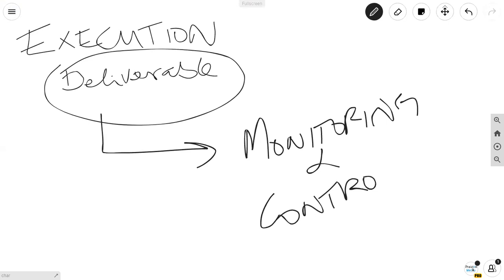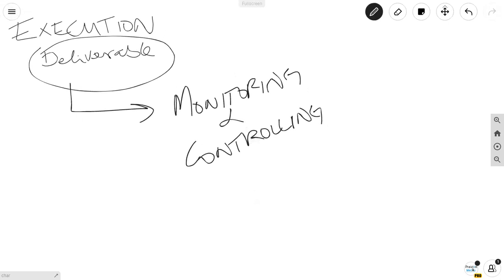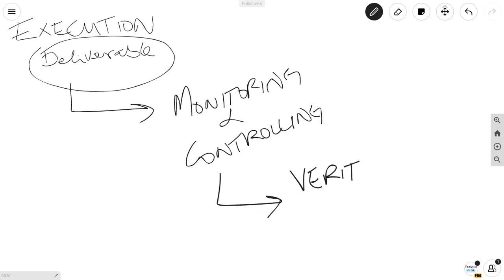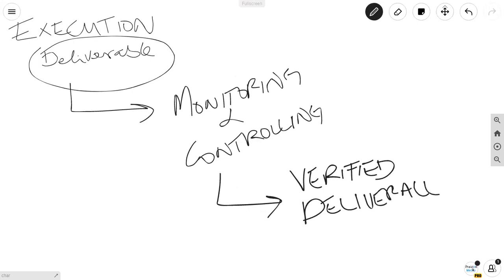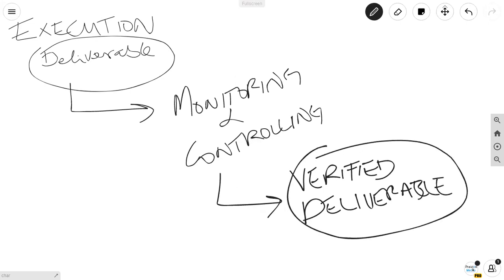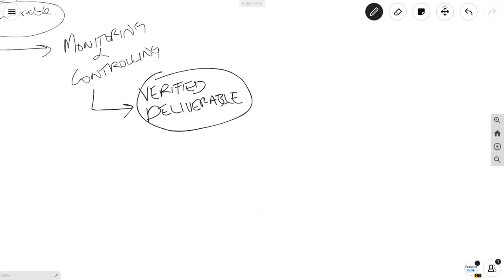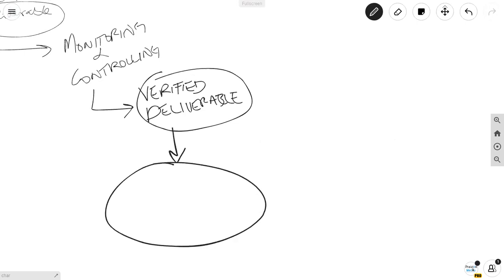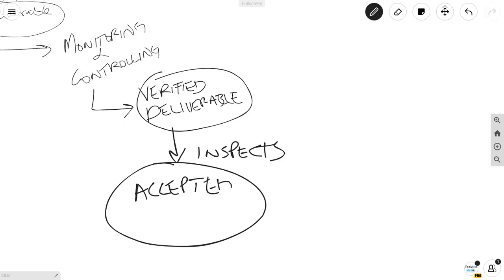As you're working the project, you're checking to make sure everything is going according to plan. Ultimately, as you check your deliverable, you're going to end up with a verified deliverable — meaning it's been checked and is good to go to your customer. In monitoring and controlling, that verified deliverable goes to the customer, and if the customer inspects it and decides it's good, you get an accepted deliverable.